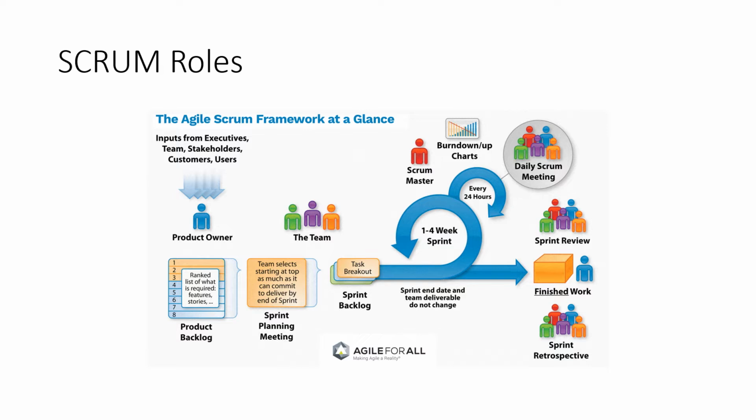Other roles in the project include the product owner, who is responsible for providing direction to the team. The Scrum Master, who can be thought of as the project manager. They protect the team by representing their interests outside the project, remove obstacles, and facilitate the rituals and ceremonies. The Scrum team, or the developers, includes the individuals that are putting together the solution. Typically, this is a very small squad of 5 to 9 people focused on a particular project.